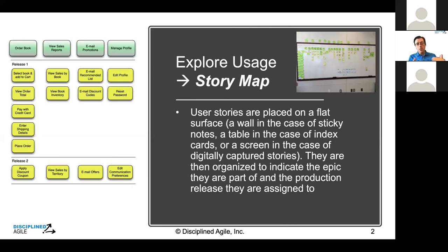Additionally, you could include scoping or release scoping in the exercise. You see here, we've got release 1 on the left-hand side and release 2 to help, and you can move things up and down to help you prioritize. I have moved from using use cases to this technique pretty much every time now. I'm involved with coaching the team as they flush out maybe a new product, a new application, or even the next release of an application. I go to this technique.